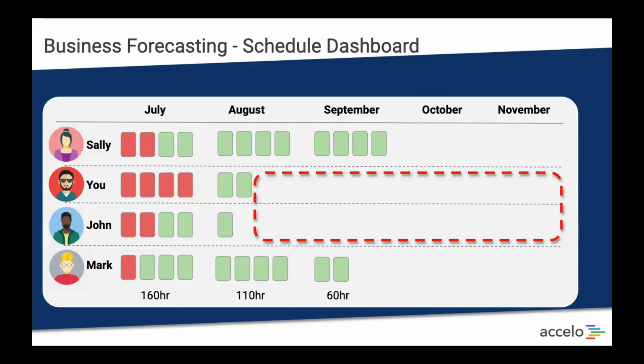And if we were to move those people, we are now inconveniencing those clients that we've already set up. So, that's a hit on our credibility, and we have to ask them to move. So if you do want some time in July, that's fine, but here's what it's going to cost for us to move that time, for us to move the committed work that's already there.